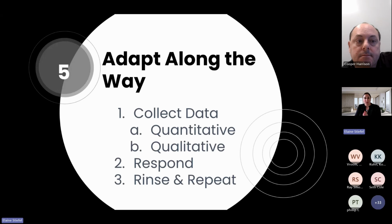What I had noticed when you start doing a pilot, there's a lot more check-ins. And then as you do the first phase of adoption with your first 25%, you have a lot up front. But then in phase 3, you are just getting more questions. But because you've built the capacity within each building, for example, in our first adoption, we had 13 teachers adopt in each secondary building and 3 teachers in every elementary building. We are building the systems of support right within that building so that hopefully if a teacher has a question, they know who they can go to.